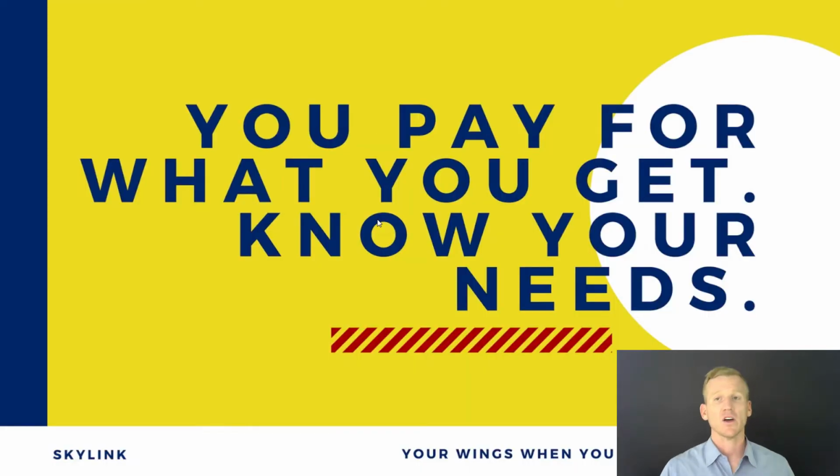If it's too good to be true, almost always it's too good to be true. And actually, let's take a step back. That goes back to, if you know that an average repair time for your APU is 30 days, and somebody is quoting you, we have to send it to the shop to get repaired, and it's about 5 days. Is that really realistic? So even when you're focusing on prices, look at the lead time. Is that actually realistic? No, probably not. You probably need to factor in 30, 45 days. So if your APU is coming off in 14 days, there's nothing on the market, and your vendor is quoting you 3 days, you might run into a problem. So really look at that.